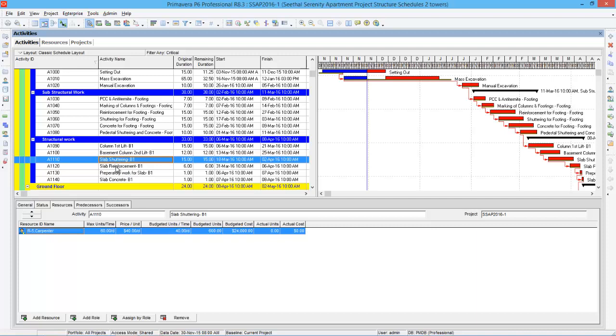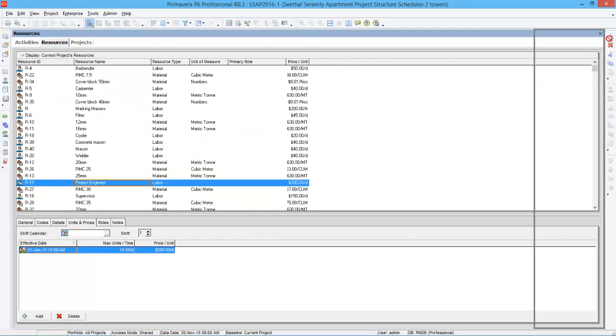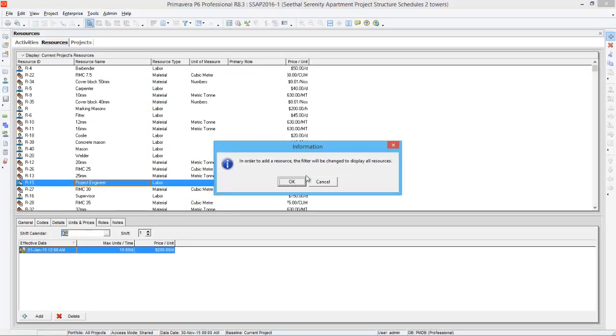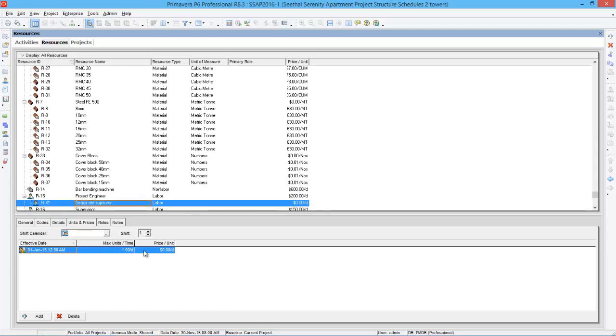So now my management is asking me to remove the supervisor from all the assignments and change it to senior site supervisor. So what I do, I have to go to resources. I need to create that resource first. So create a new resource, name it as senior site supervisor.